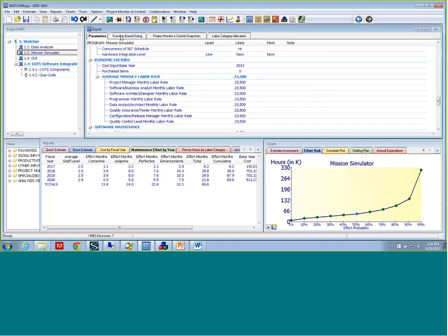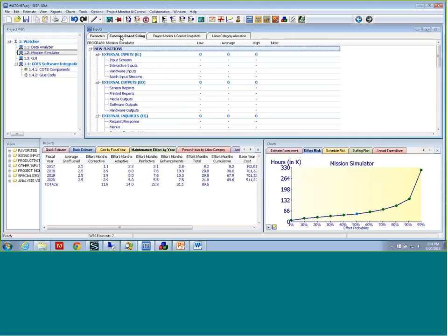Is this a feature like in COCOMO, where if you don't want to give SLOC, you can give it based on inputs? These are another way of getting to your charts, am I right? Yes. There's a notion of effort or size based on the complexity of a screen or a report or an output. This is your way of doing that. It's already built in, pretty much standards for those. So yes, that's another way of getting that size in without specifying SLOC as the individual count.